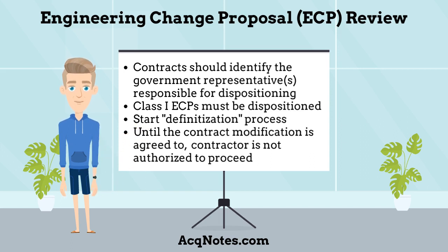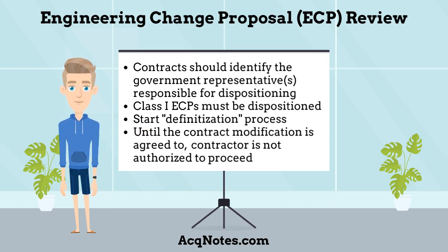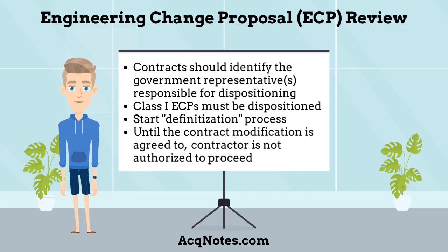Class 1 ECPs must be dispositioned — approved or disapproved — for implementation by a properly constituted Government Configuration Control Board. After the Configuration Control Board direction is issued, it is important to proceed expeditiously with the definitization process.